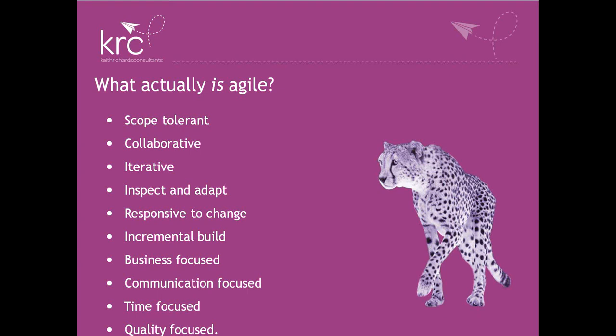If we can keep hitting deadlines over 2 weeks, 3 months, a year, we get a lot of benefit. We get control, we get credibility. And if we can also make sure that what we're doing is well designed, well documented, well tested, we've got what's called low cost of ownership. So it's those bottom two that if you get your Agile to work really well, you get these two things. If you like, you could say you get them for free. Now, most traditional approaches aren't built to aim at giving you on time and on quality because often the scope is fixed. In Agile, the scope isn't fixed. This means we can bring it in on time and we can hit the right quality expectation.